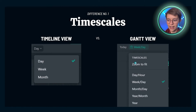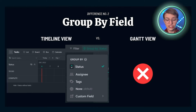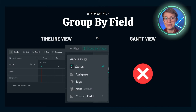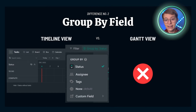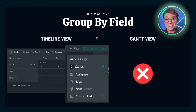The second difference between these two views is the group by functionality. Remember when I showed you that timeline allowed you to create those lanes inside the view itself? If you need to organize information by anything other than the list and task relationships that already exist, you're going to want to use a timeline view, because Gantt views lock you into the spaces, folders, lists, and task structure that you already have. So if you like to see things chunked into stages, phases, or assignee batches, you're probably going to find a timeline view more useful.